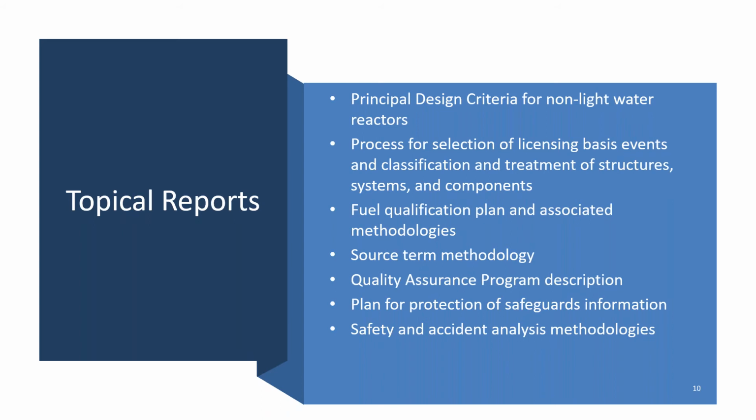The next item, and we're going through topical reports, and these are things that you submit to us for our approval. So I want to make a point here about topical reports. The next one, we're indicating that you should request staff review and approval of your proposed process for selection of licensing basis events and classification of treatment of SSCs, or indicate that you plan to use an already approved process.